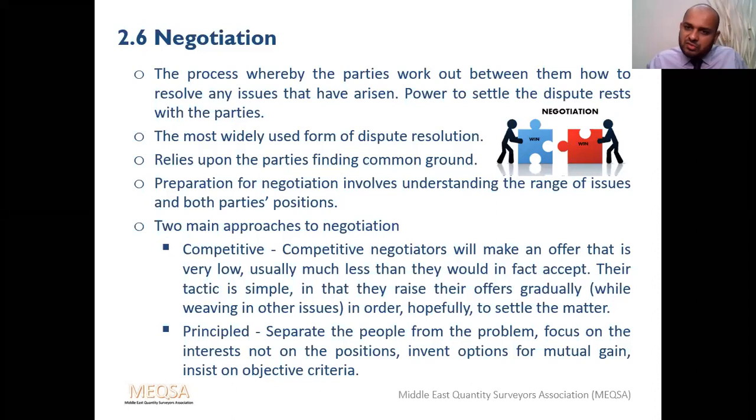But negotiation does not necessarily have to be a win-win situation. Still, it's better to have a win-win situation because in the long run, even though you have agreed with the other party for a very minimum amount, one day if they realize, oh, I agreed to a very minimum rate, then in the next negotiation meeting he will not be with you. He will be on the other side again. He'll try to recover whatever loss he incurred in the previous negotiation. So for a long-term relationship, it's better to go in an amicable win-win way. So we are moving to the next slide.